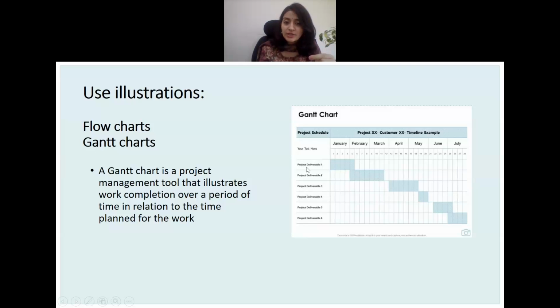So you can say, for example, here you can write patient enrollment, you can write data collection, you can write data analysis, and you can give it specific timelines that in the first 6 months from January this to this, we want to do patient enrollment. So like that, you should divide your study into different sections and clearly state that over a period of my study, I am going to divide the different components into these months or days and so on and so forth. This makes your methodology very simple to look at, and it can be easily inferred when the reviewers are going through your concept proposal.